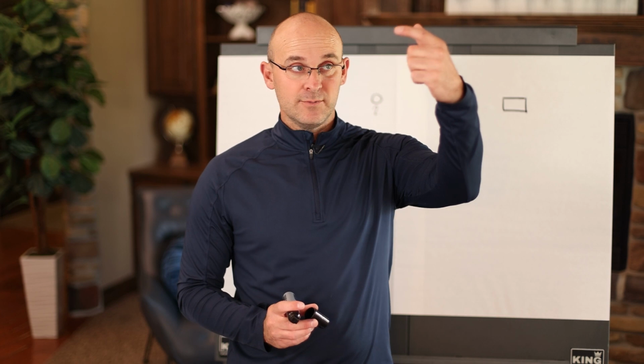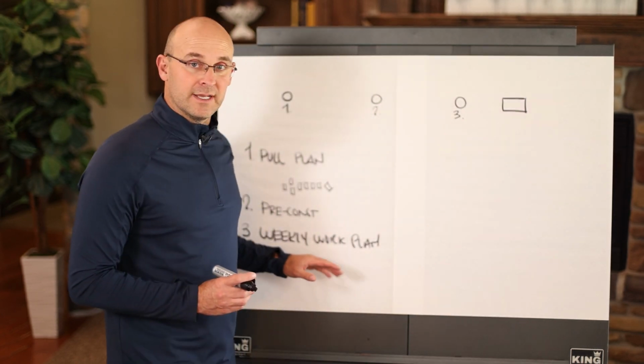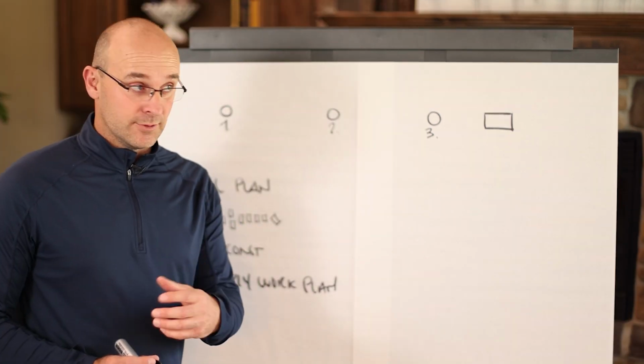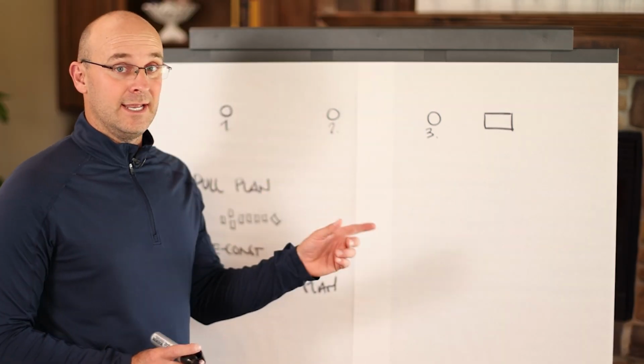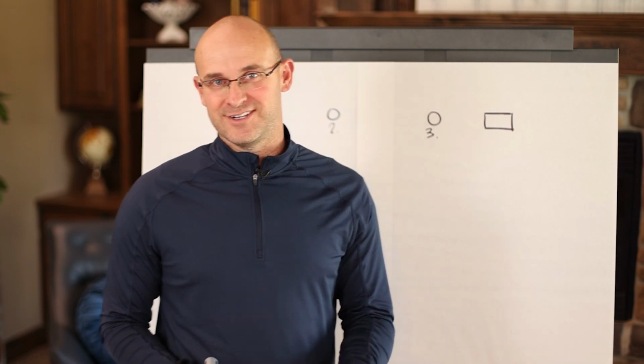And what the team will do is coordinate that with the other trades and come up with a weekly work plan that can be locked in, collaborated on, committed to, with hopefully 100% certainty. And so that enables all of the trades to work together so people are not in your way and you're not in somebody else's way.